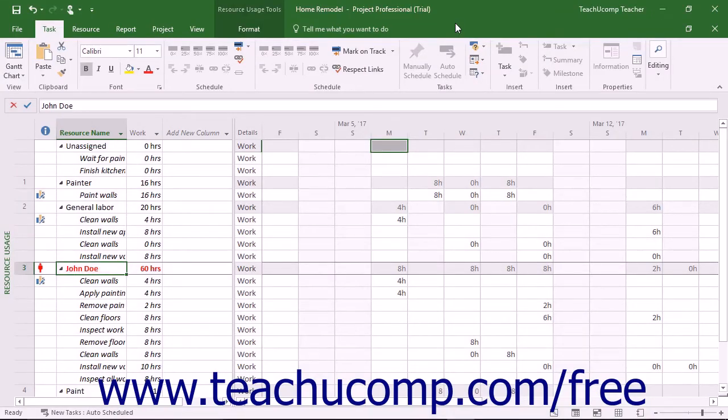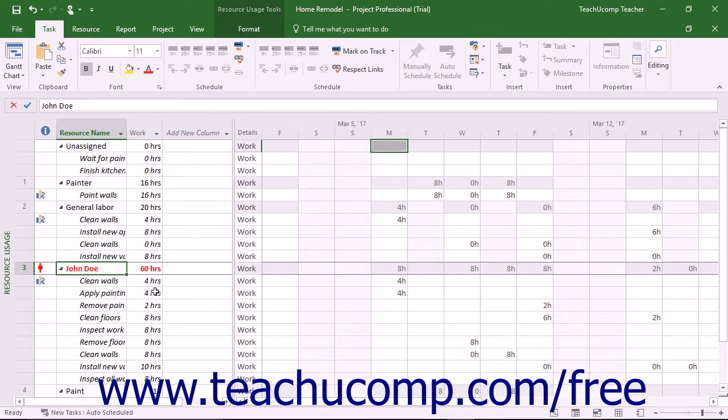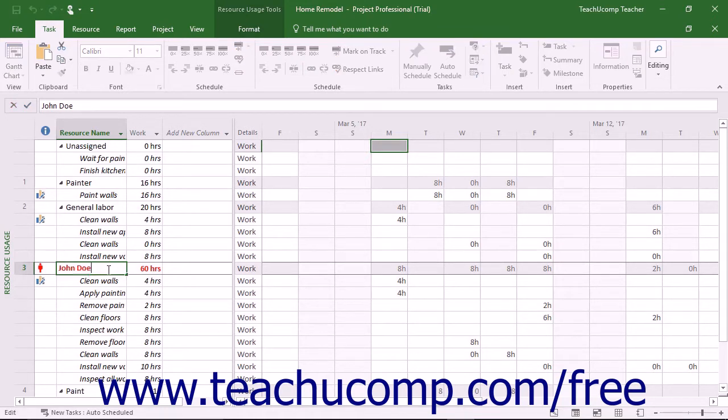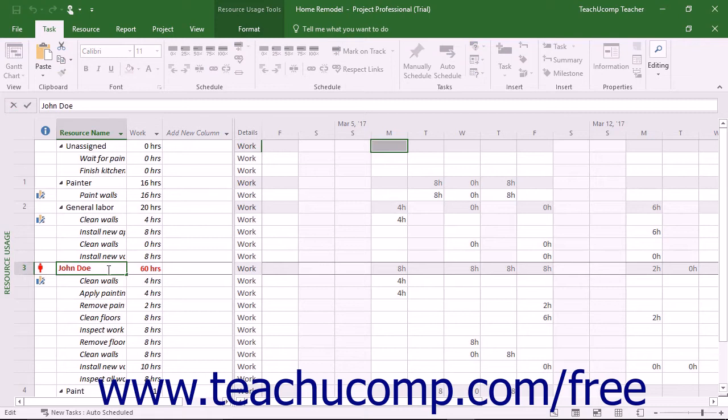As we saw in the previous lesson, you can use the resource usage view of a project file to examine resource allocation. You can make manual adjustments to an overallocated work resource to ensure it remains fully allocated based on the units of work available. In addition to manually correcting overallocated resources, you can automatically level overallocated resources in Microsoft Project.